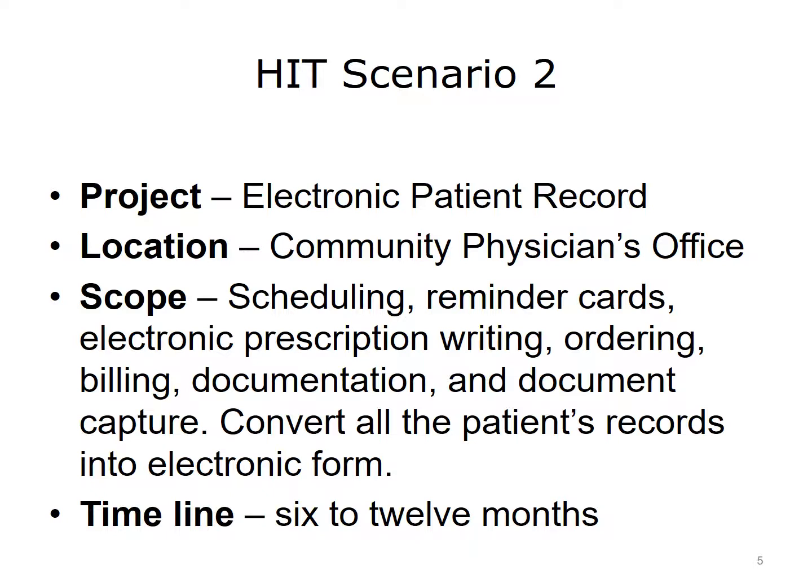The timeline for a project like this could be from 6 months to a year. The access to resources is also a consideration. A small physician's office probably doesn't have its own IT department, so that support would need to be outsourced. If it's a larger community physician's office that has an IT staff on the premises, it could host its own servers. That would decrease the cost somewhat, so you should factor these details into your cost analysis.